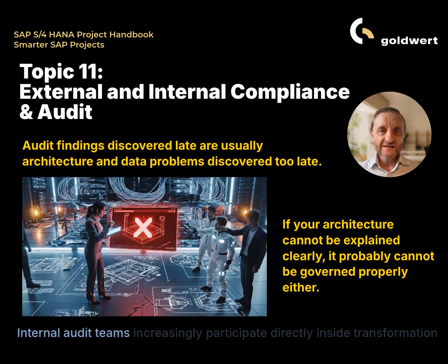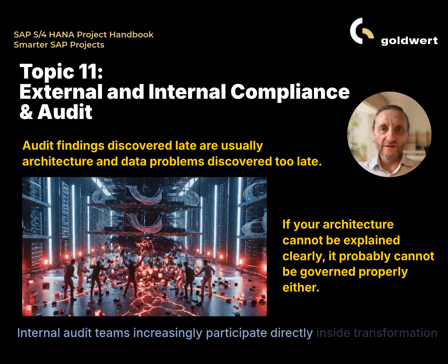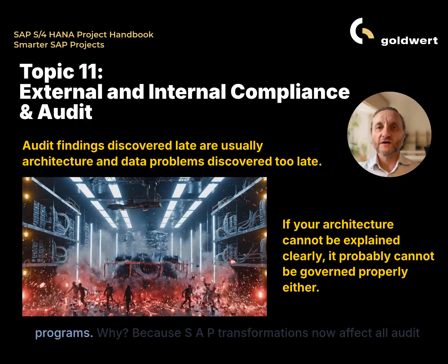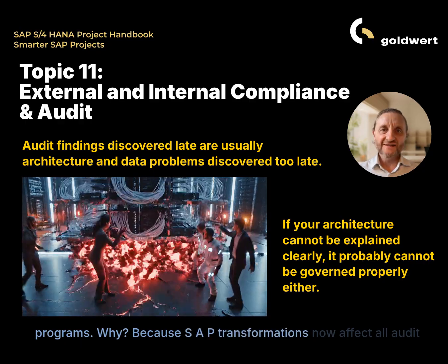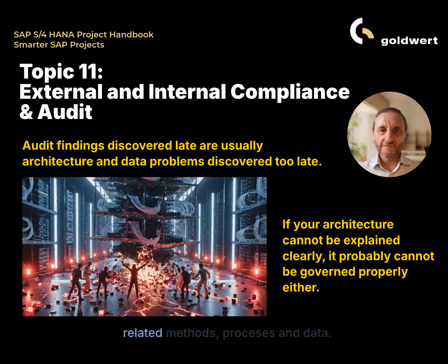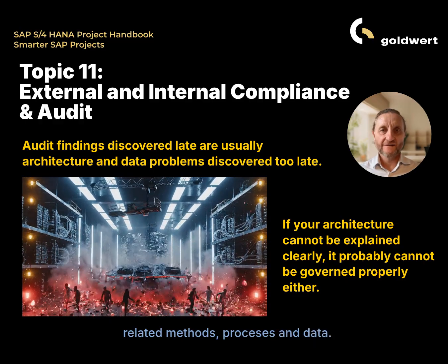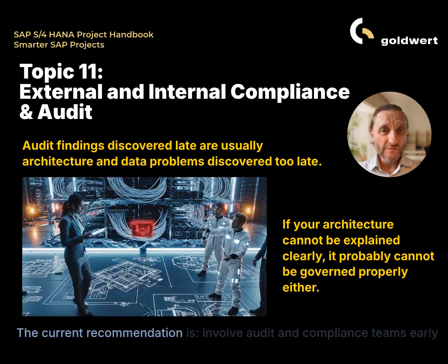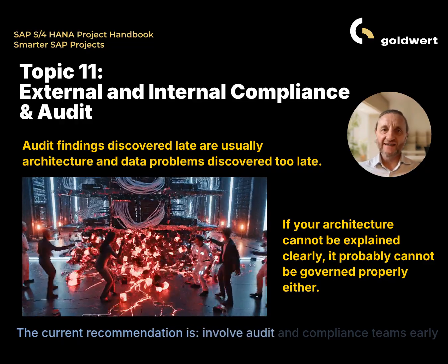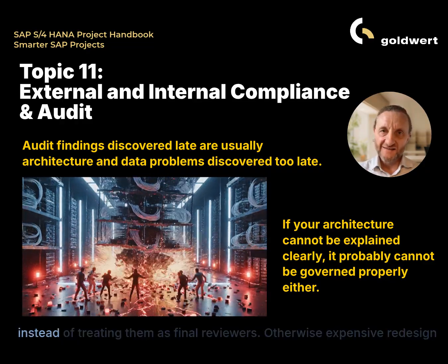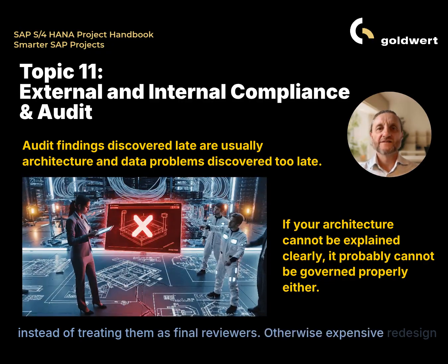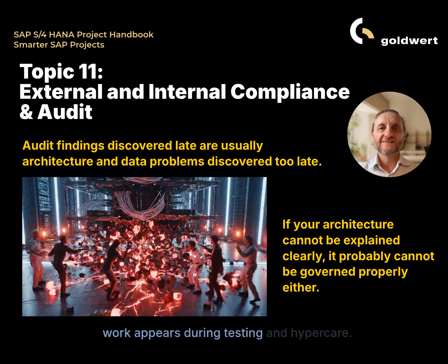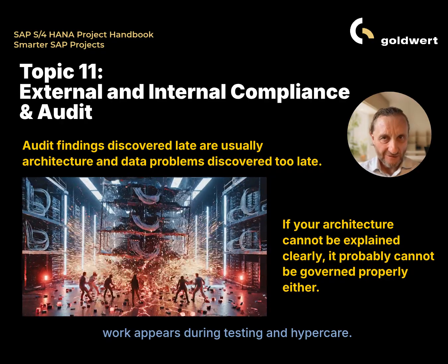Internal audit teams increasingly participate directly inside transformation programs. Why? Because SAP transformations now affect all audit-related methods, processes, and data. The current recommendation is to involve audit and compliance teams early instead of treating them as final reviewers. Otherwise, expensive redesign work appears during testing and hypercare.